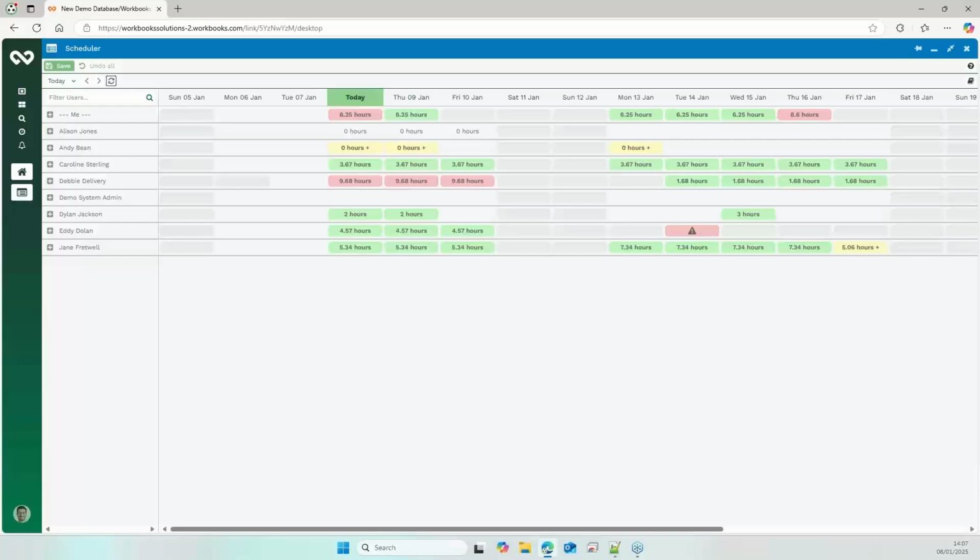As I say, on Thursday, and it's straight on a Monday morning, Monday, Tuesday, Wednesday, Thursday, those projects have been recalculated. Those tasks that have been assigned to me have been recalculated to take into account I'm not there Friday to do any work. So if someone assigns me a new task within a project that includes a Friday, the system will just go, okay, and it will adjust it. It will put me in for the Wednesday and the Thursday, skip the Friday and add it to the Monday, and so on. All taken care of automatically.